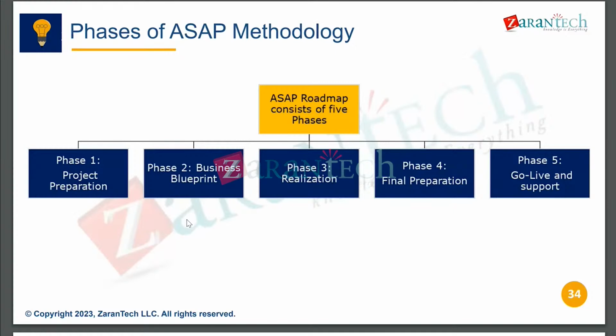As per the contract, it will be 1 month, 3 months, 5 months, or 6 months, during which the implementation team will support. Whatever issues the production users face, they'll create a ticket or a request. Then the implementation team pitches in and supports the business users to run their day-to-day business without any issue. Once the hypercare support phase completes, it will be given to the support team, who will take care later on. The implementation team will come out of this project completely.